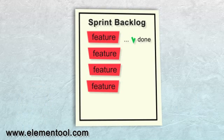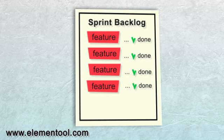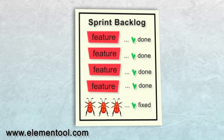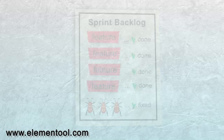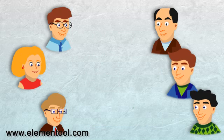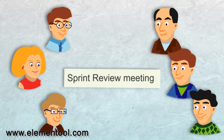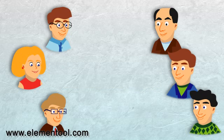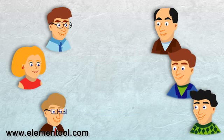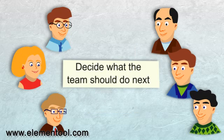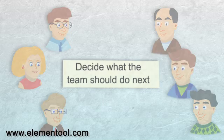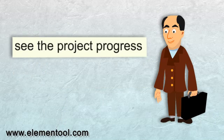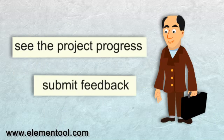In every sprint, the team must complete the work that was defined for this sprint. Bugs that are related to the features on the sprint backlog should also be fixed as part of the sprint. At the end of each sprint, a sprint review meeting is held. In this meeting, the team presents what was developed during the sprint to the product owner and other stakeholders. This meeting helps to decide what the team should do next. The clients can see the project progress and submit feedback.